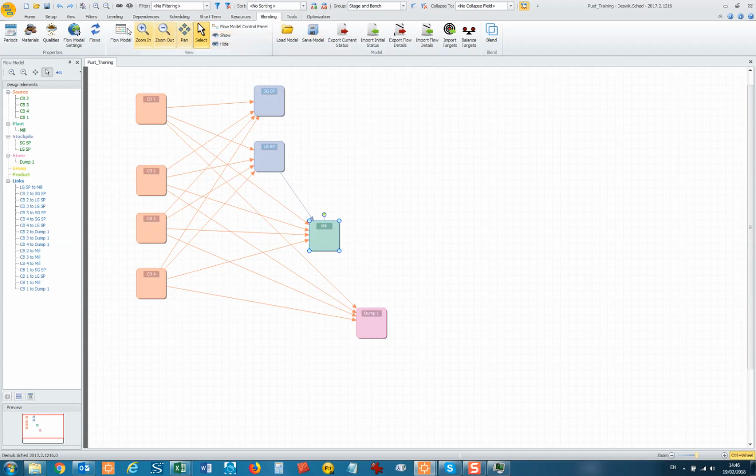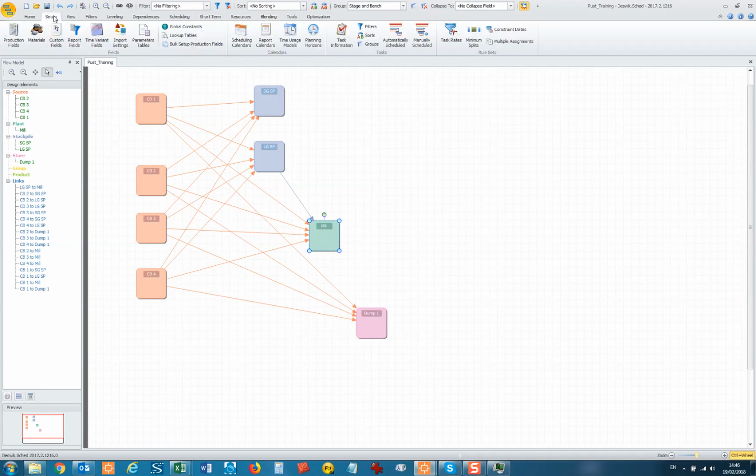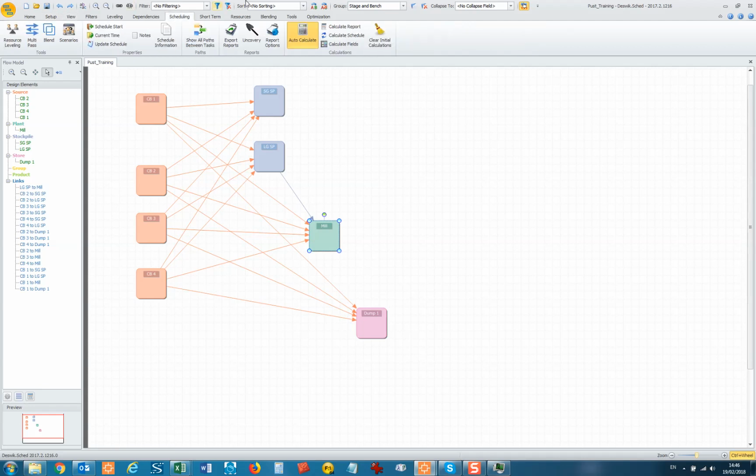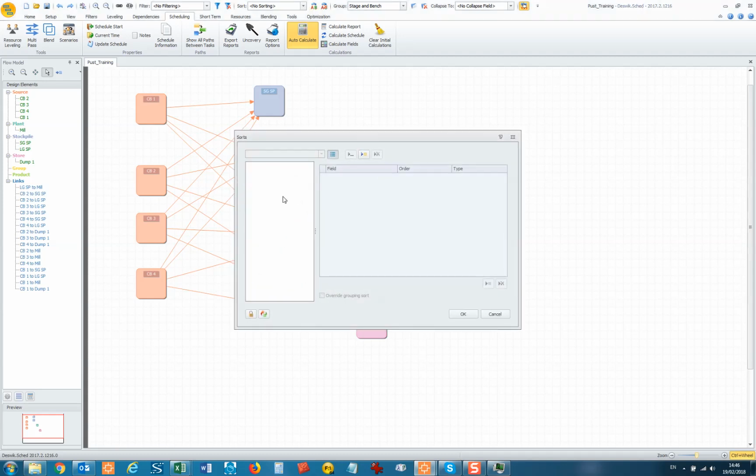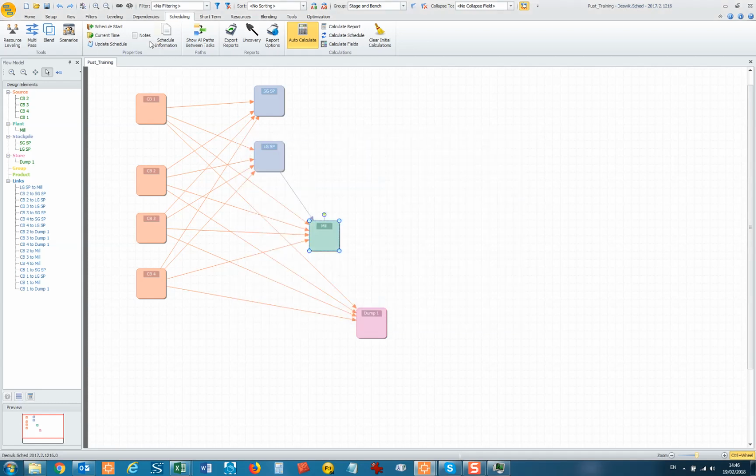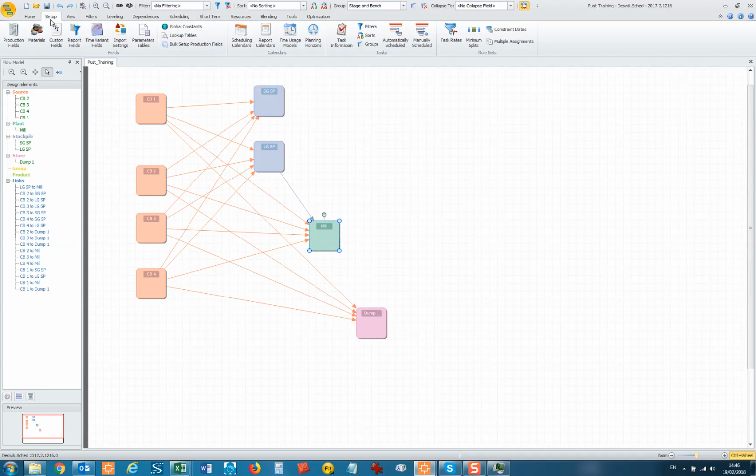You can create a sort which basically targets the mining sequence which has been coded into the model. So that will guide the mining sequence, but it's no more effective than knowing what the sequence has to be from NPVS first. So that's what I would suggest. So that's basically it.